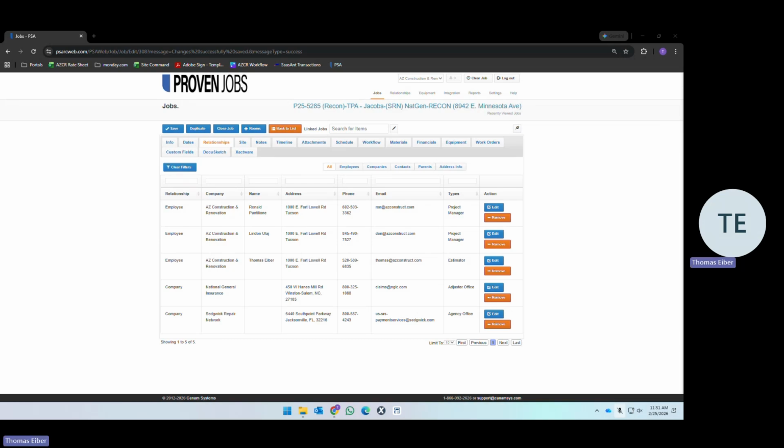Estimated start and completion dates are also a deliverable that you provide to the operations manager. You're going to let them know when you expect to start, when you expect to complete, and the operations manager is being held to a standard of making sure that all these estimated start and completion dates are being documented well. And as long as the delay is not caused by us, no issue. But if we're causing delays in start or completion, that is something that you and the operations manager are being measured against, potentially affecting your incentive structure.